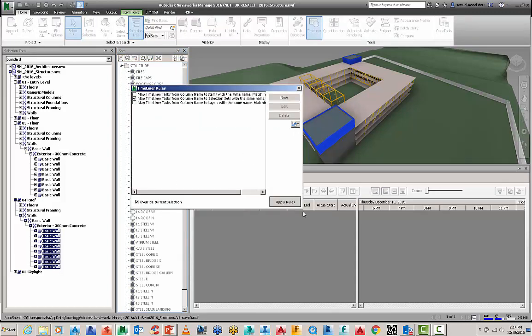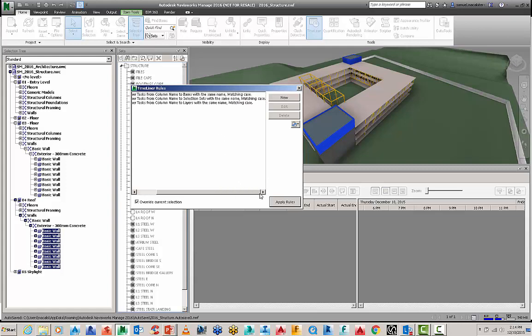So the rules I want to use here to run this command, I'm just going to bring this across a little bit, I'm going to map the timeline of tasks from the column name to the selection sets with the same name matching case.